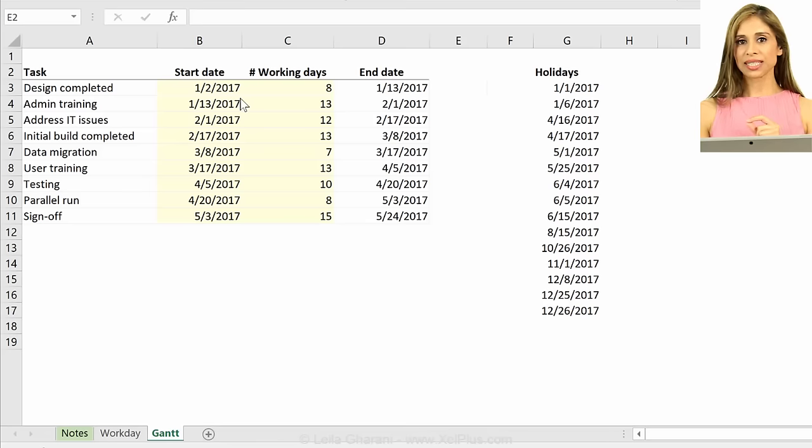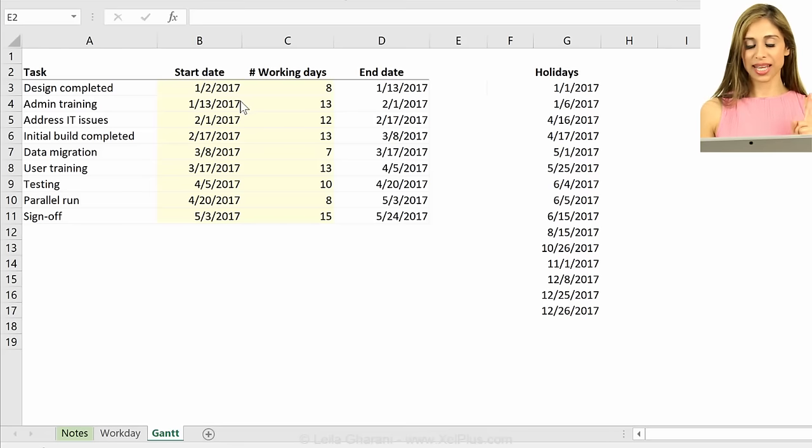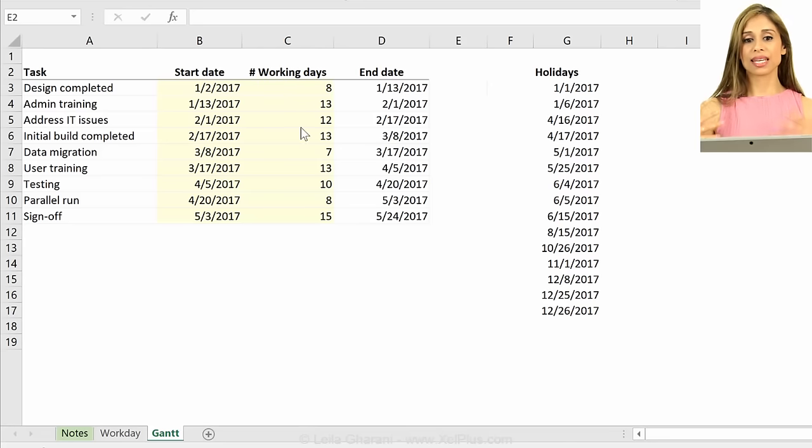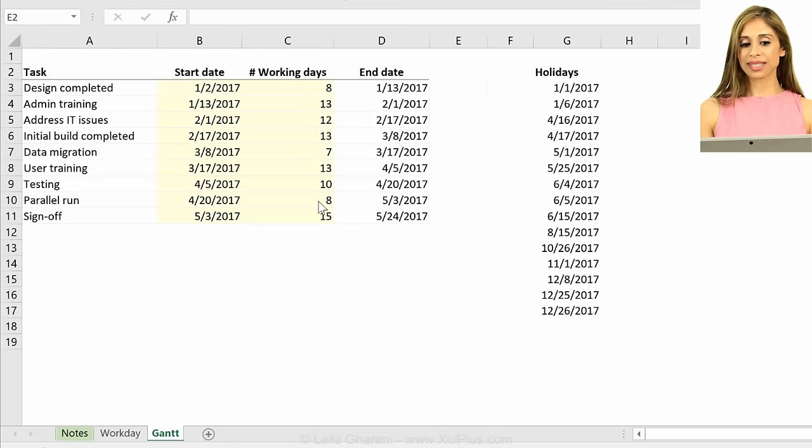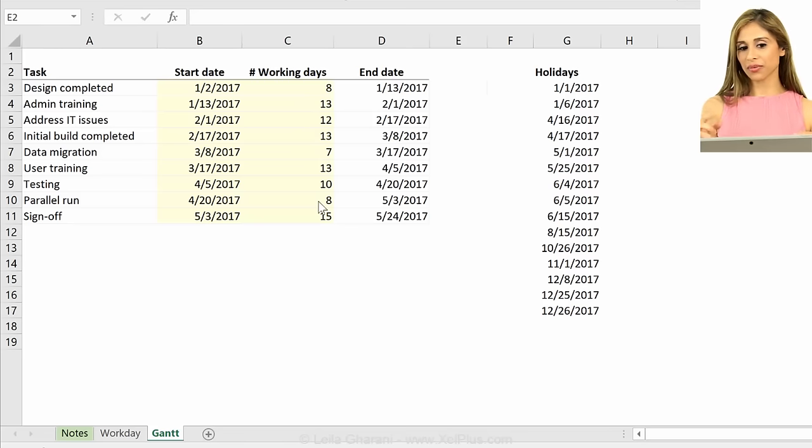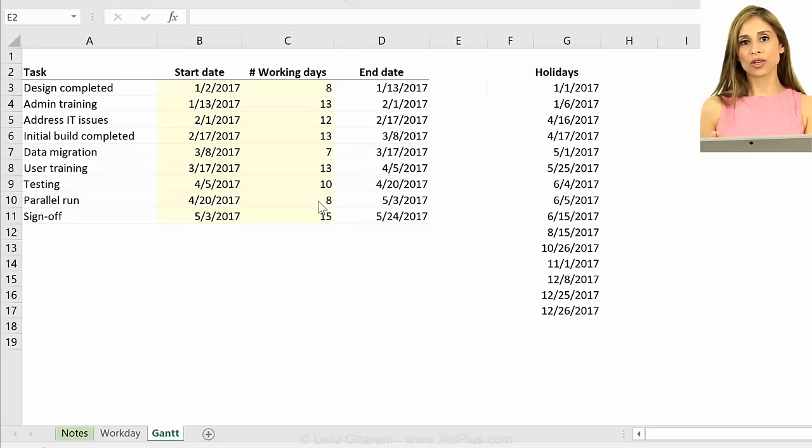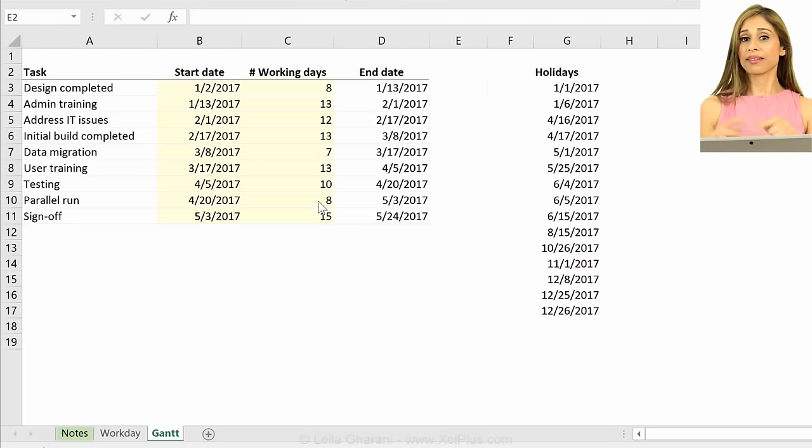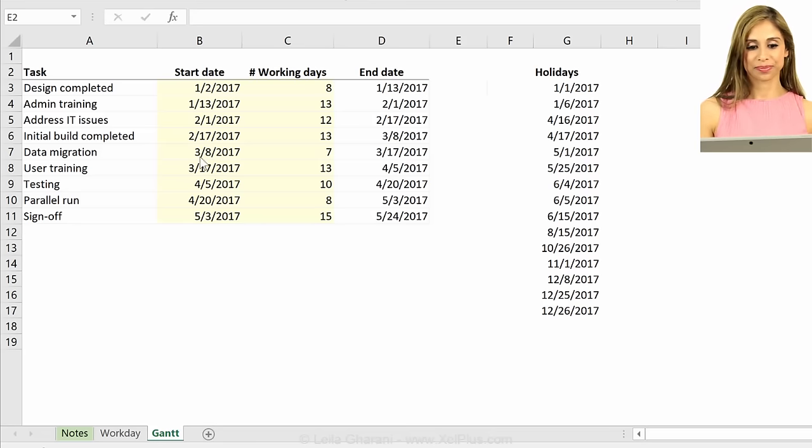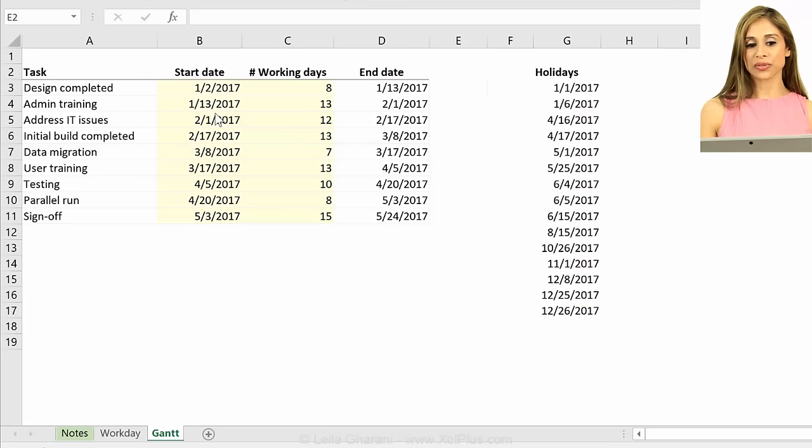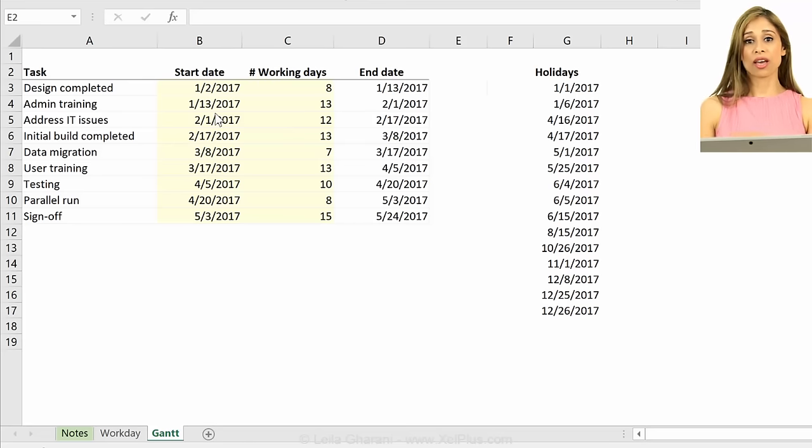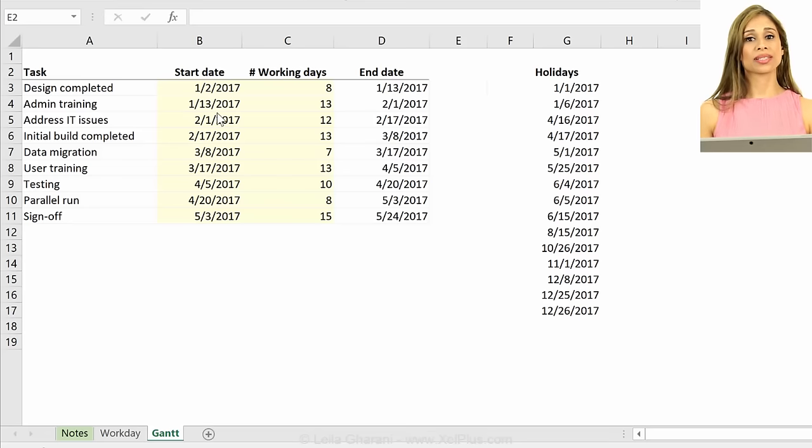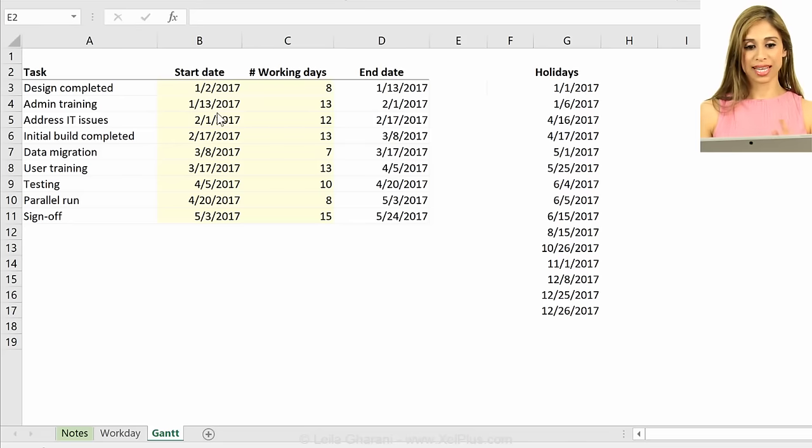The first thing that occurs to me, because one of my favorite techniques is using the error bars, that I can use error bars to get that difference, the number of working days, they can be my error bars. And because they're going to be horizontal, they're going to go this way, I can only have horizontal error bars in chart types where I have numbers on the x-axis. So which chart type is that? It's a scatter plot. In a scatter plot, I have values on the x as well as the y-axis, and that way I can use error bars that are horizontal in that chart.